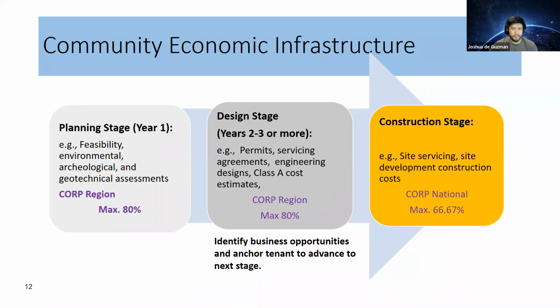Then once you have all those assessments, you go into the design stage. Again, this would be supported through the regional program. These would explore permits, any servicing agreements that you might need to explore, engineering costs, and Class A design estimates. So that would be pre-construction. Then once all of that and all of the other shovel-ready criteria are met, we'd see you apply for the construction stage through the national process. That would be for the site servicing, the site development, and the major construction costs.